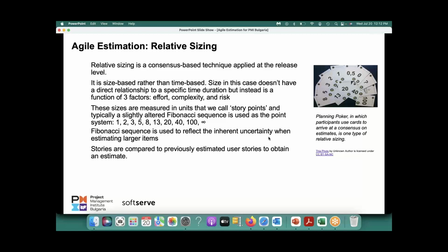That analogy, if you start with that, is absolutely all right. But what it does when you say one story point is up to 2 days is that it takes care of complexity and risk, because you are not saying 2 days, right? You're saying up to 2 days. So it takes care of those 2 factors also. And now you're giving it a range, not a number. And then your stories are relatively sized. I think if you start with that, that will be great. Okay, so that's relative sizing, or story pointing.